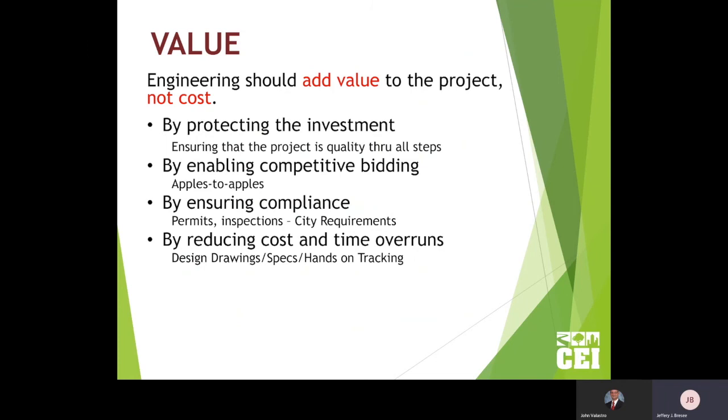Going back to apples to apples bids, if you've left ambiguity in what you're asking for, you're not only going to get uncompetitive pricing, but later on you're going to get hit with change order, change order, change order, and the price just keeps going up and up. Well, we don't want any of that to happen. So by the time we do all that, we feel confident that we've added value and hopefully even reduced the overall price, even though there are engineering fees involved to make all that happen.